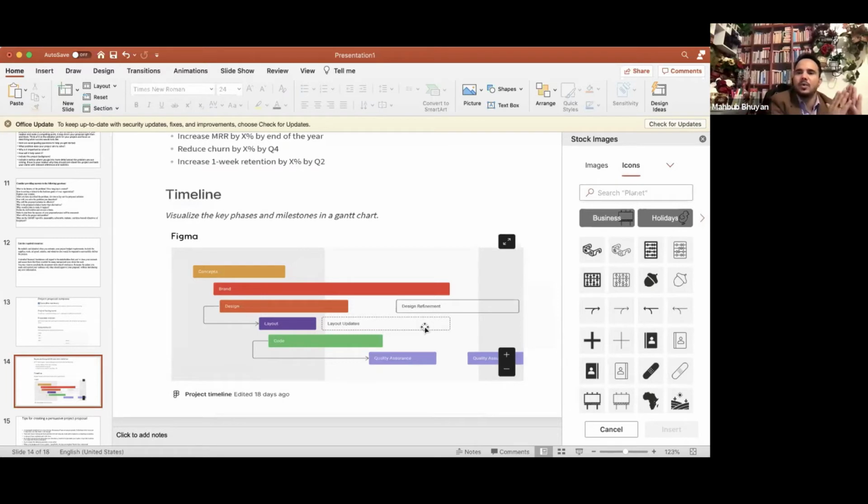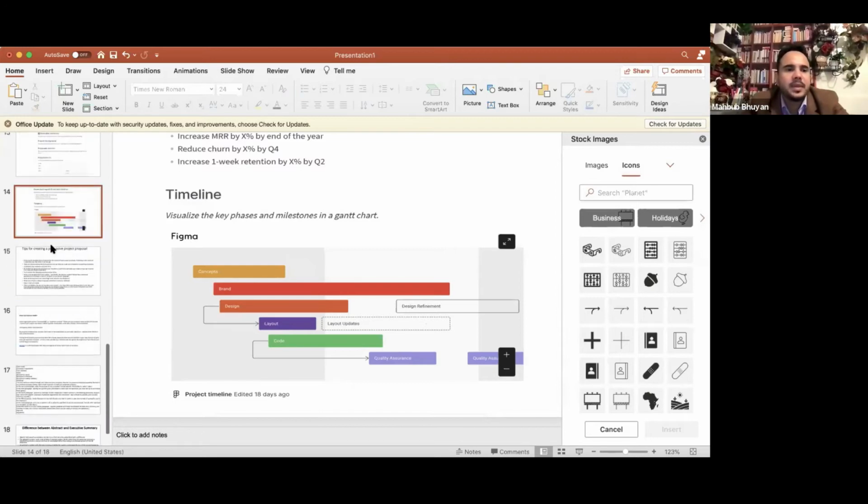And then we'll start one by one, you'll say. If you think something will go from start to the end, you can also write it there. For example, it is not applicable, but for your understanding, you can write supervision. Supervision will start from the very beginning of the projects to the end of the projects. So your line should start from the starting point to the end point, and this whole line is about supervision. I think I could make it clear. If not, then I will answer you again in the question answer session.